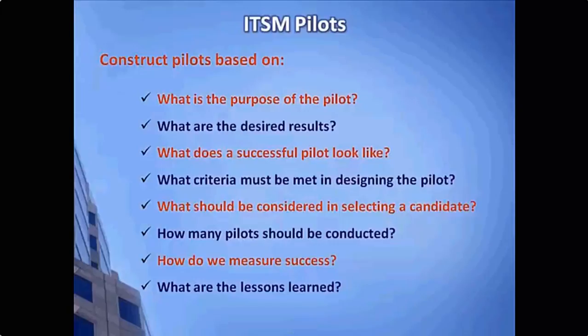When you run a pilot, it is recommended that the pilot period not exceed more than 2 to 3 months, if at all possible. This ensures that the pilot stays very contained in terms of its scope and time, and it either does work or it doesn't work. Past that point, you can certainly show progress by starting to deploy to the rest of the organization very quickly, especially if the pilot turned out to be very successful.